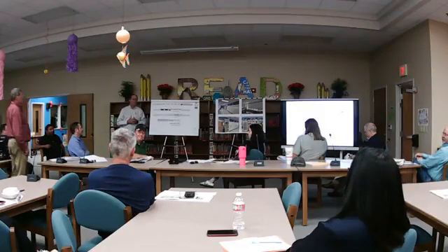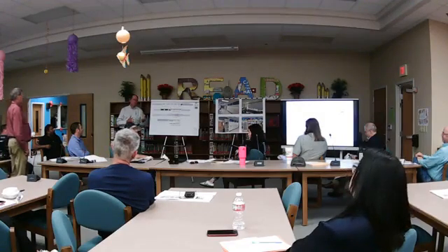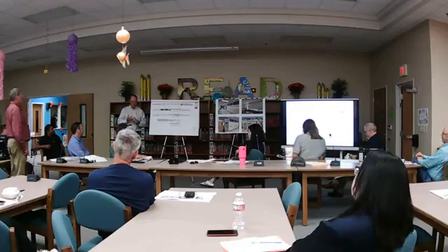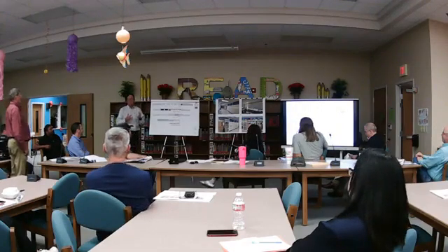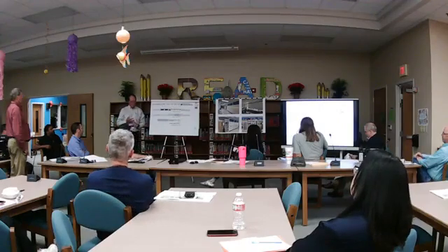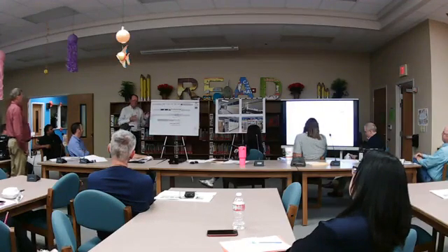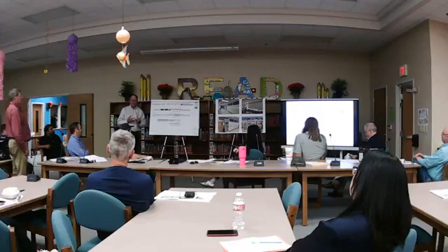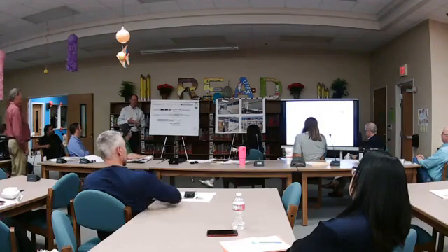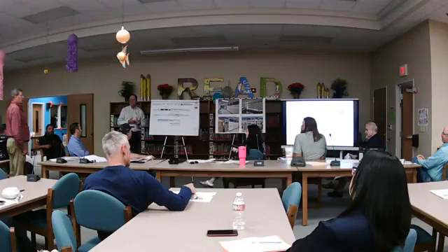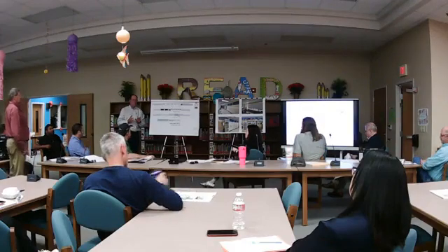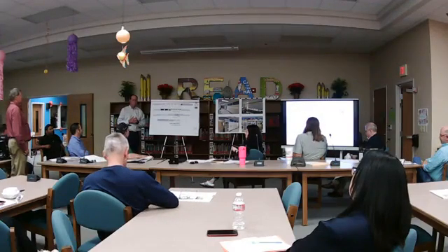And can you schedule these people pretty easily when we're ready to go? Well, that was one of my questions, because we've been getting ready to order the millwork, and I want the millwork here at least for the first area before we start. I want it sitting there so we don't have to wait. The millwork, the flooring, all the doors and hardware, some of this has long lead times. So anything we're concerned with in lead times, we'll probably order in the next week or so.